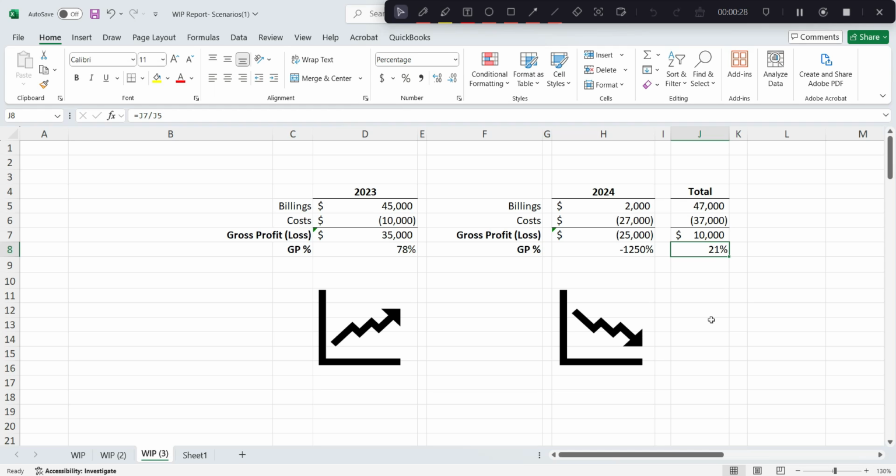Now, the purpose of overbillings and underbillings is to stabilize revenue recognition so we avoid these sudden fluctuations, because it is misleading. If I were to show you 2023, you would think we had an excellent year, knocked it out of the park, did really well. If we go into 2024, you're going to think we're going bankrupt, we're losing a ton of money, it's all over. But that's not exactly the case. So over-under billings come in to stabilize revenue recognition.